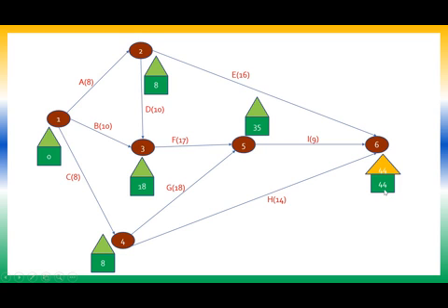So for the backward pass, whatever is the last rectangle value will become the triangle value. So 44 is copied here. 44 minus 14, 44 minus 9, I get 35. Then coming to these two values, this value can be calculated using this 35 and 44. So this value will be 35 minus 17, 18. Okay, because it has only one node coming in.